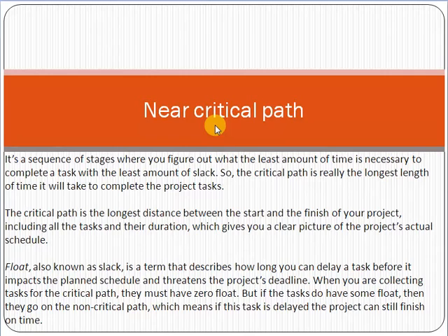Okay, friend, when we talk about the critical path, this is the longest path of a project, having activities which are necessary to complete the project, and all the activities have zero float or zero slack. Zero float or zero slack means that if the activity is delayed, it will delay the project timelines as well. So no activity on the critical path can be delayed. Any activity on the critical path should have zero float. Zero float means that it cannot be delayed.